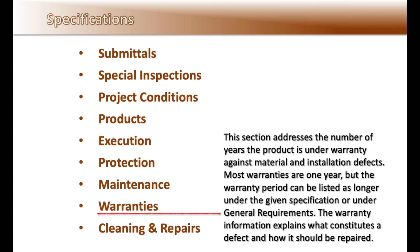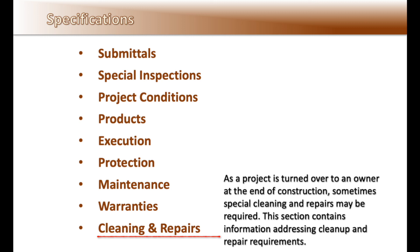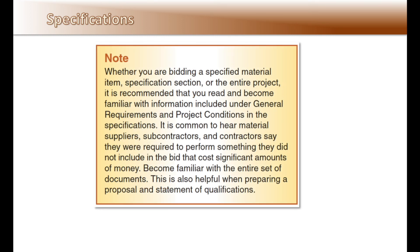The warranty information explains what constitutes a defect and how it should be repaired. As a project is turned over to the owner at the end of construction, sometimes special cleaning and repairs may be required. This section contains information addressing cleanup and repair requirements. Whether you are bidding a specified material item, specification section, or the entire project, it is recommended that you read and become familiar with the information under general requirements and project conditions. It is common to hear subcontractors and contractors say they were required to perform something they did not include in their bid that cost significant amounts of money. Become familiar with the entire set of documents.